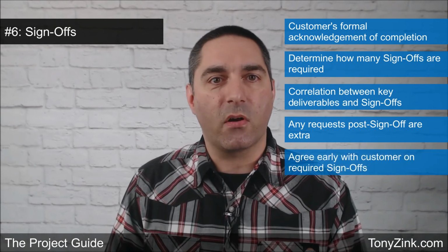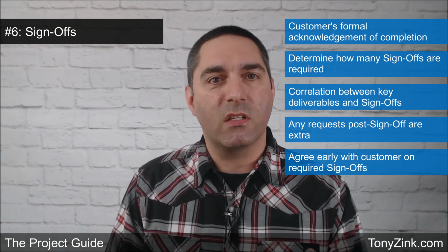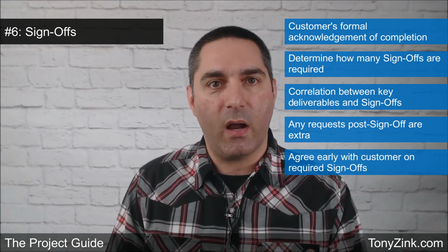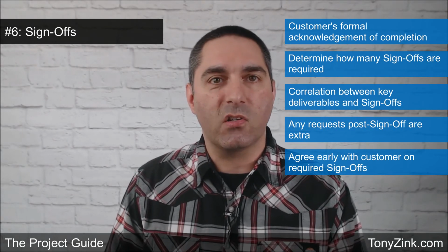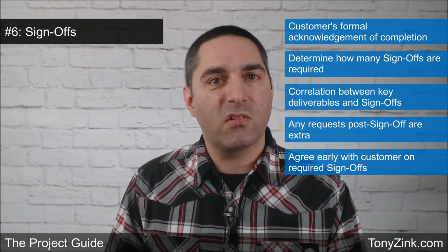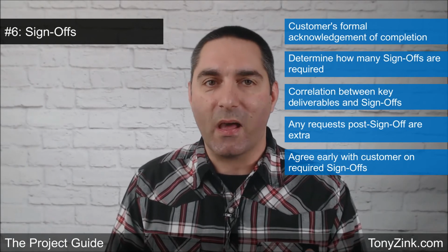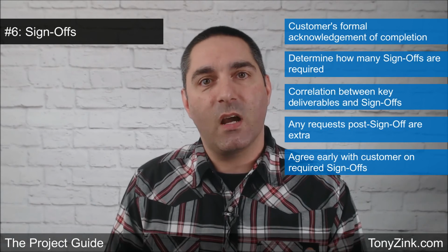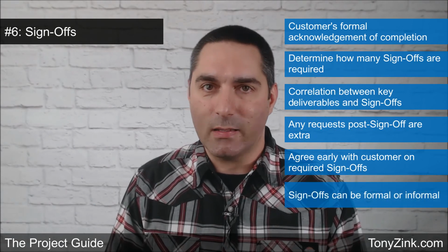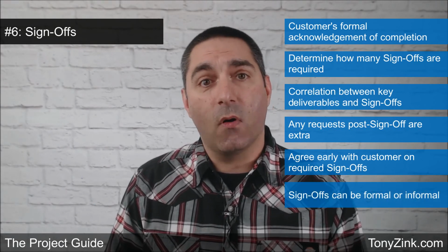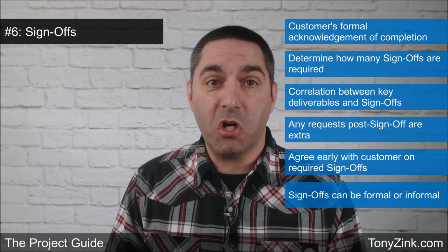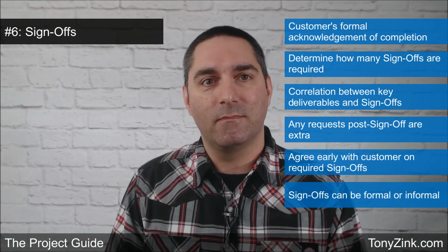Agree on the sign-offs with your customer at the beginning of the project. That way they'll know what to expect from an approval perspective throughout the project, and they will also understand that any post sign-off changes will come at a cost. Sign-offs can come in the form of a formal signed document, or they can be in the form of an informal, thanks, looks good, kind of an email.